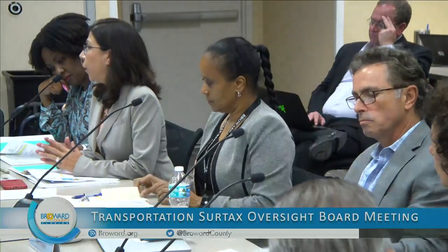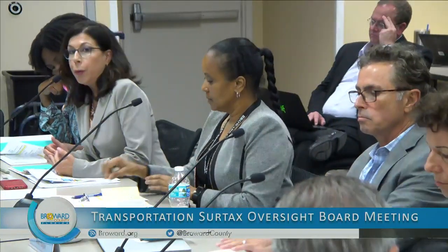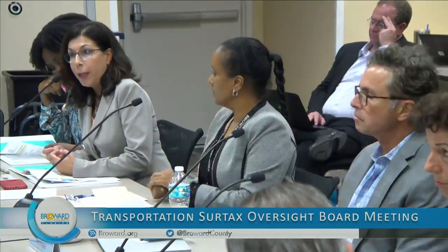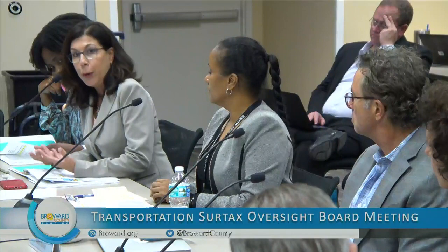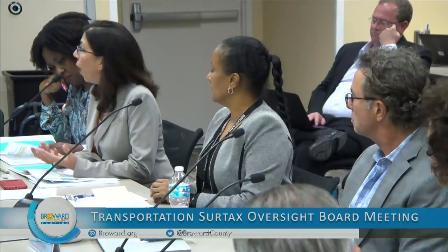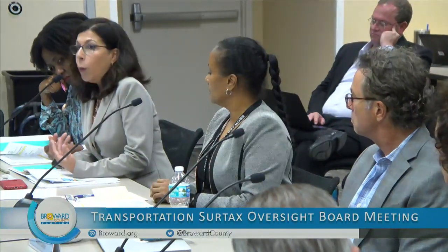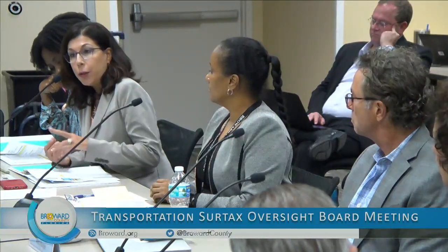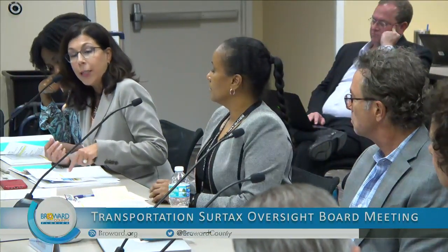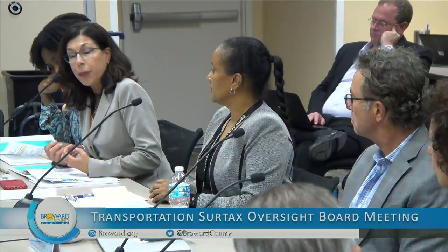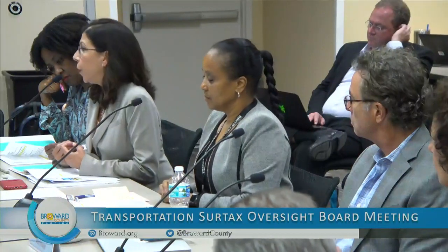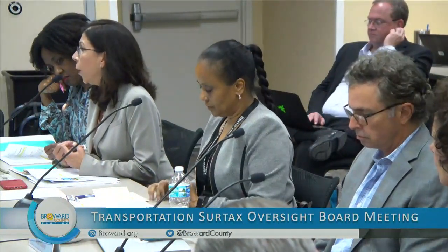There are sufficient funds built into the financial plan to allow us to accommodate new projects in the future, because we all knew as we were building the plan that there would be things that we wanted to do in out years that we couldn't contemplate today. The way that those will be handled is in two separate and distinct ways. If it's a city project that's new, it has to wait until February of 2021 under our interlocal agreement with the MPO in order for a municipality to apply for a new project.